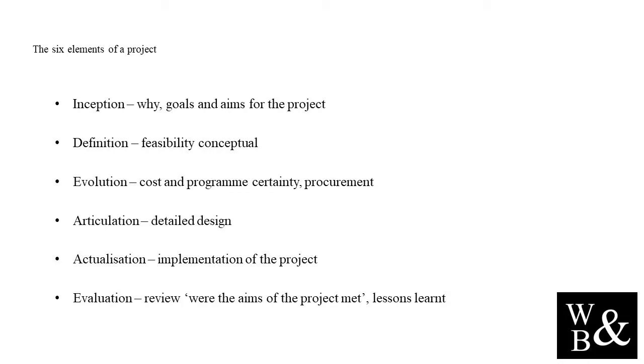To complete this element and move on to evolution, we need to clearly define the project, identify gaps in existing knowledge and information, compile an information gathering system, define whole project budget and identify where project funding will come from, identify health, safety, environmental and project risks and develop a risk register, develop an assumptions and decisions register to track assumptions, and initiate engagement with planning if needed.